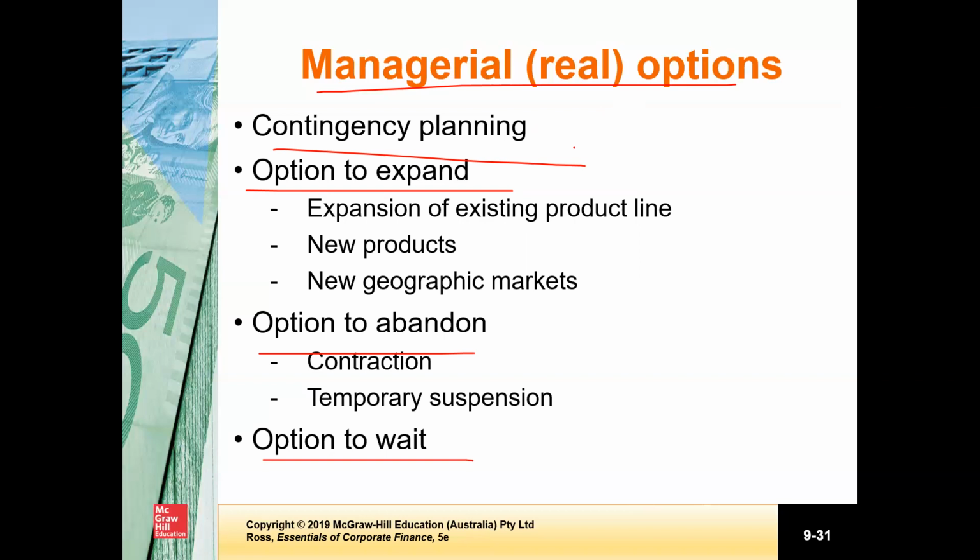For example, if the sales demand for a particular product were greatly to exceed expectations, we might investigate increasing production, right? And if this were not feasible for some reason, we could always increase cash flow by raising the price. Either way, the potential cash flow is higher than we have indicated. Overall, because we ignored the option to expand in our analysis, we underestimate NPV, as in our previous analysis.